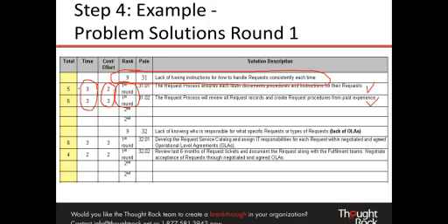This allows me to add these things up and just come up with a basic prioritization or ranking factor about, are these quick wins or not? If I can get down to time estimates of 1 and cost and effort estimates of 1, then those will be the things that will actually produce my quick wins.